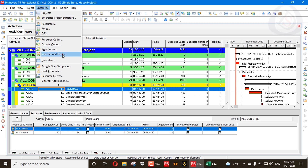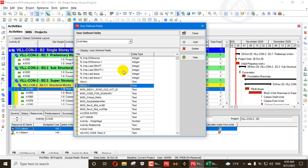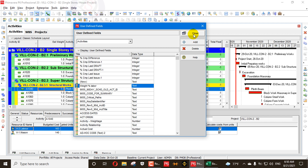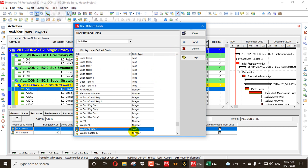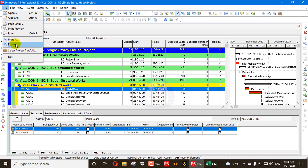To see where this weight percent column comes from: go to Enterprise, then User Defined Fields. I'll create a column — 'Weight Percent for Labor Units'. You can also create one for non-labor. This needs to be converted to the Number type. I have already created 'Weight Percent Number Labor'. I'll close this and repeat the export steps.